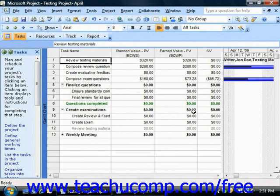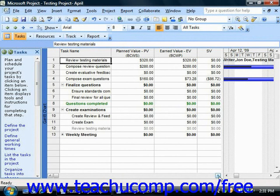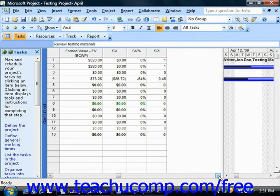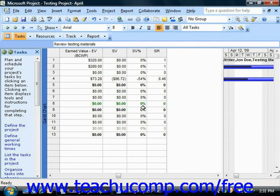The earned value is the budgeted cost of the work performed as of the status date. The schedule variance, or SV, is the difference between the EV and the PV values. The schedule variance percentage, or SV%, shows the ratio of the schedule variance to the planned value expressed as a percentage.